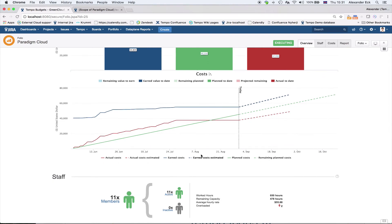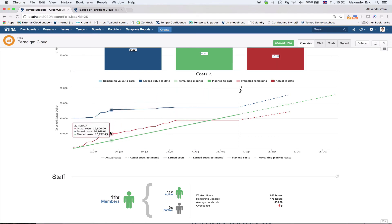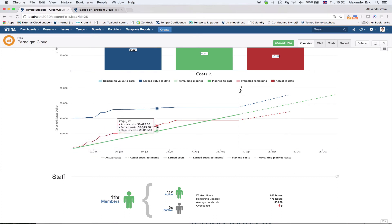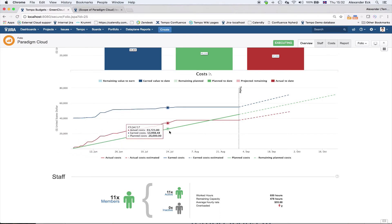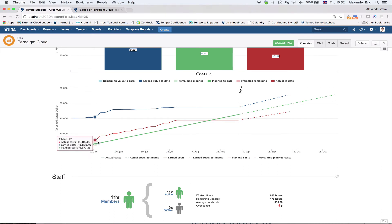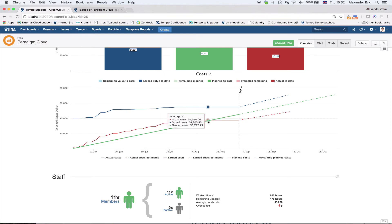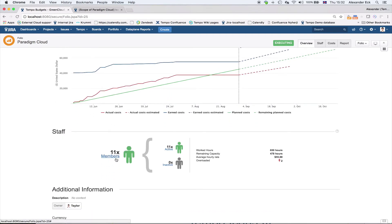Beneath the cost section we see different graphs showing the same information visually. The green line represents planned cost, the red line represents actual cost, and the blue line represents earned value. The planned cost grows steadily from start to finish, while actual costs go up and down depending on how many hours have been logged on the Jira issues within the scope. The staff section shows how many team members are working on my project.